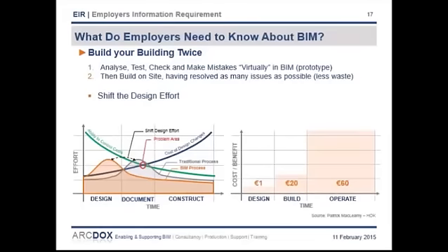Also, if you consider that for every euro spent at design stage, 20 euros will be spent in construction and 60 euros in the operations of the building, you could turn this around and say that for every additional euro that you spend in design stage, allowing more time to get the building information model resolved and tested and analyzed before going to tender, you should gain about 20 euros of value in the construction stage by having a digital model that is coordinated and can be immediately used and queried and analyzed and even updated for assembly and construction.